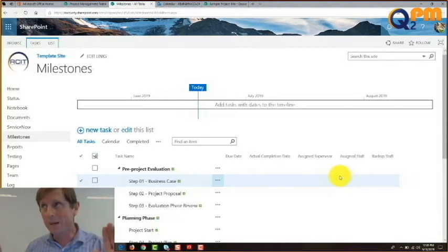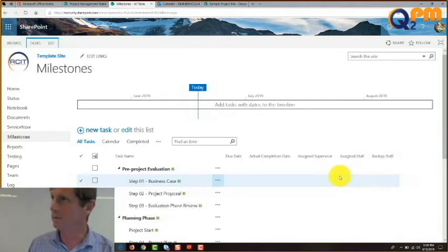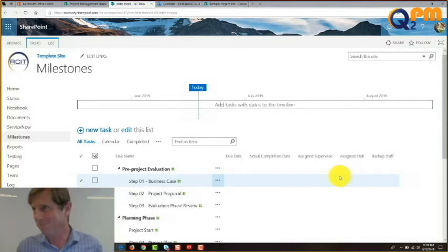But as a PM myself, what I typically do with my really busy teams is I use the supervisor as my first point of contact. I always go to the supervisor and say, can you tell me the status of Lyle? How's Lyle doing with that van? And that does two things. That causes the supervisor to make sure they're always up to speed on what Lyle's up to, and it also gives me someone to be muscle to get Lyle to do his job, right?